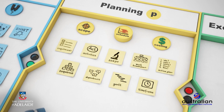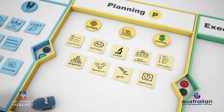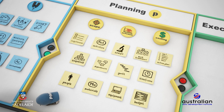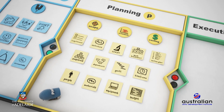Now that you have a schedule in place, you can determine the costing for the resources required to complete each of those activities. You will need to identify human resources, material, equipment, and how much time is required to deploy them to complete an activity. You can then begin to consider your financial constraints and how you will arrange the budget to pay for the resources to complete the project.